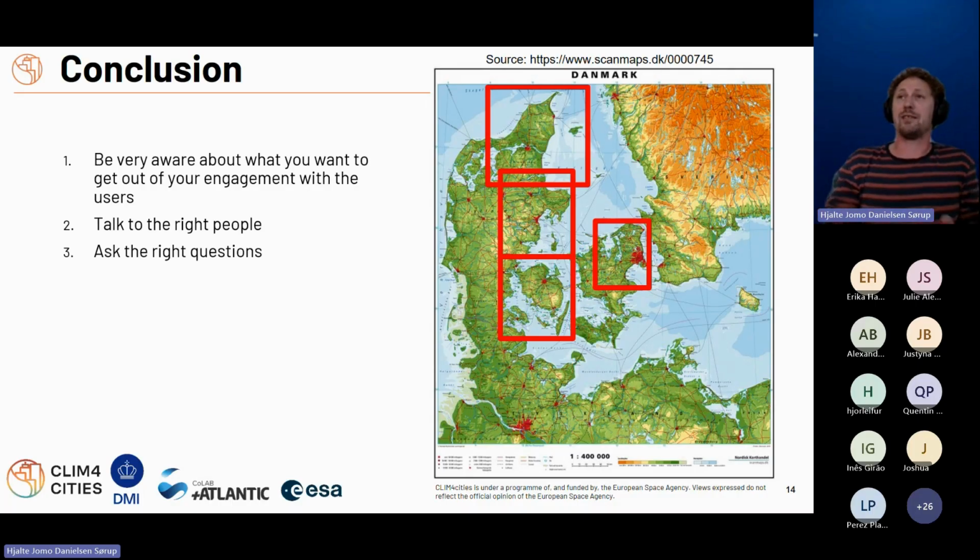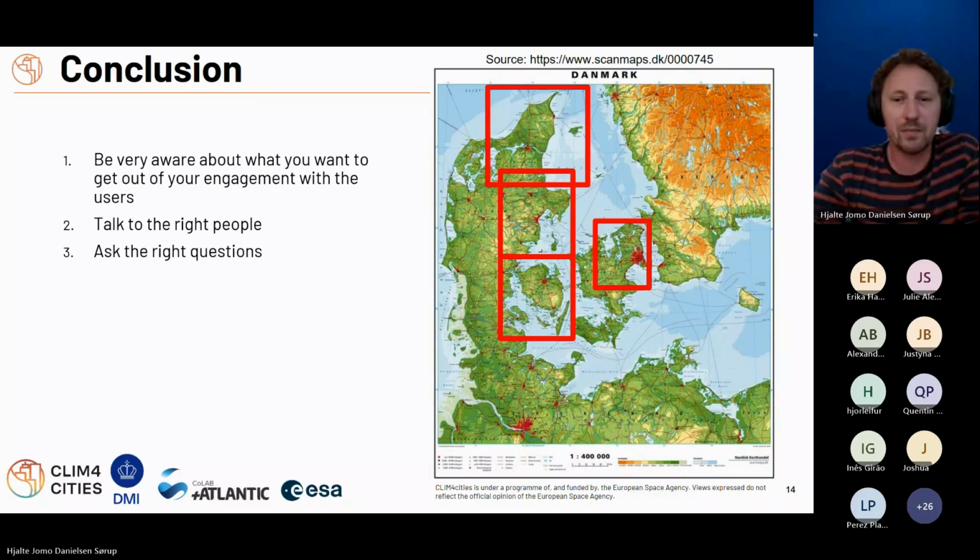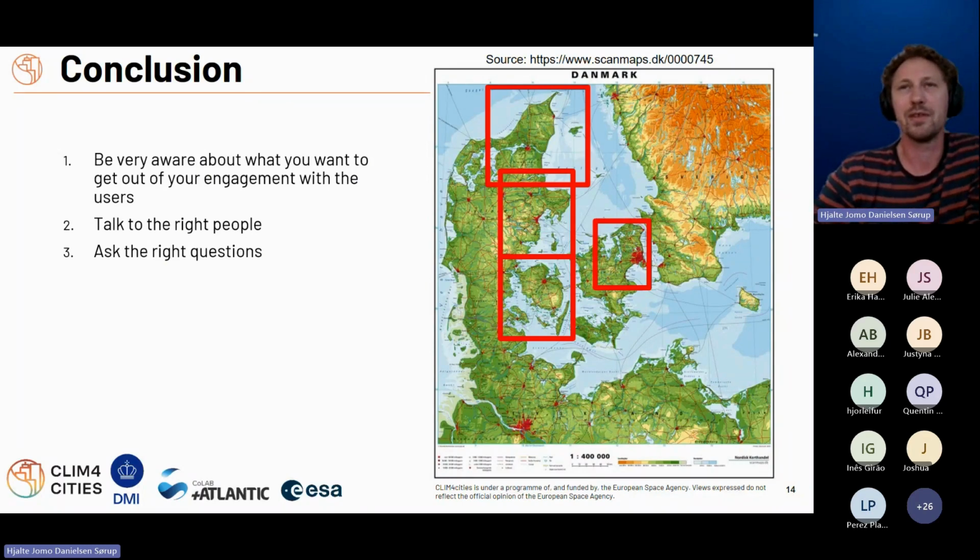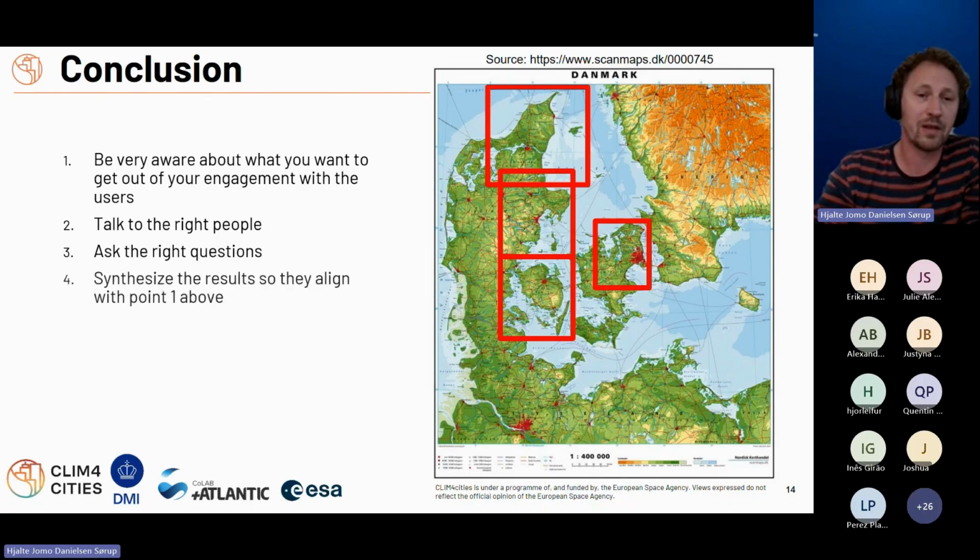In order to do that, it's also worthwhile thinking very much about how you ask questions, because if you ask too directly or too openly, people tend to want everything, and in the best and highest resolution when we're talking data, even though that might not actually be necessary for answering the questions they need to answer. So that's an important lesson as well to take on.